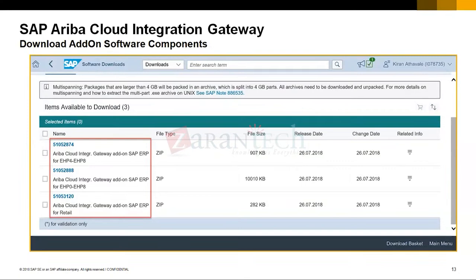So when you do the requirement gathering, we also have to demonstrate the system as well. It's not in 100% of cases, but some customers expect it. Currently I'm implementing one project for an Africa client. Their requirement, they have clearly said, is that during this explore phase, they would like to see at least 20% of the data in our system.